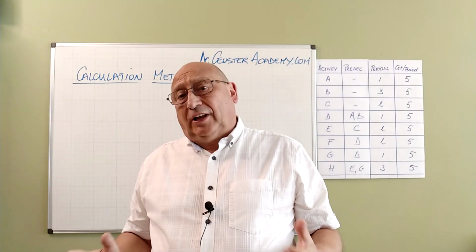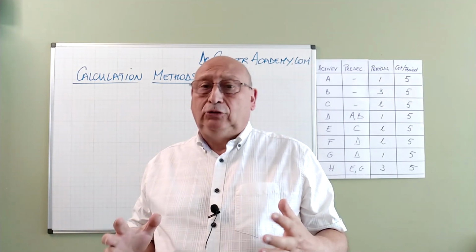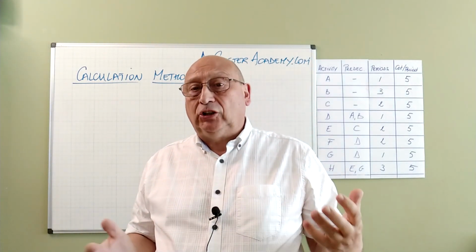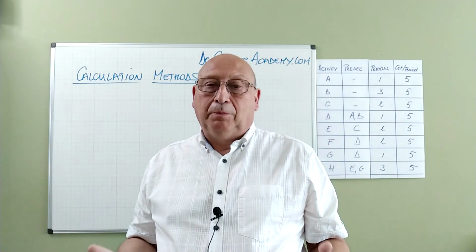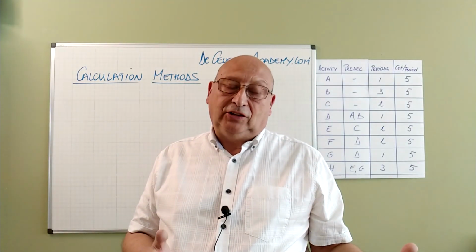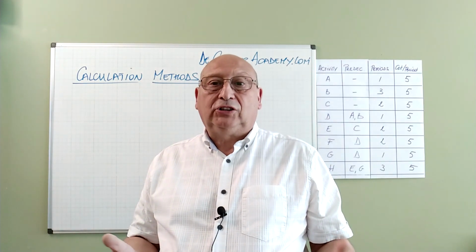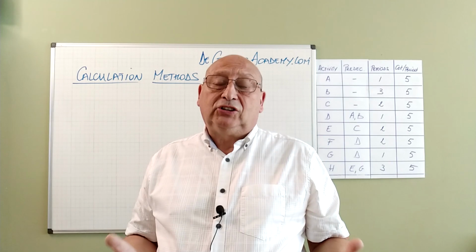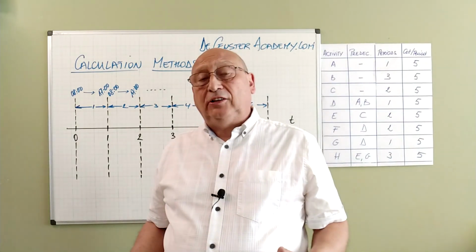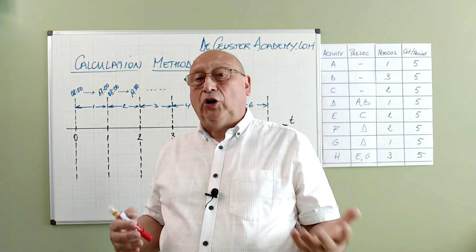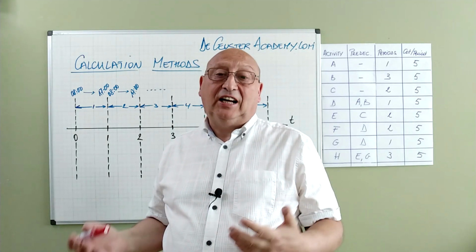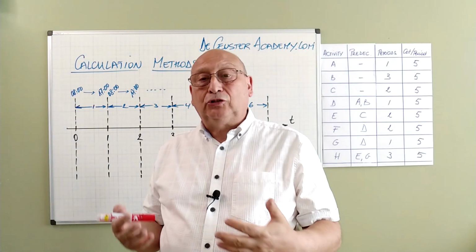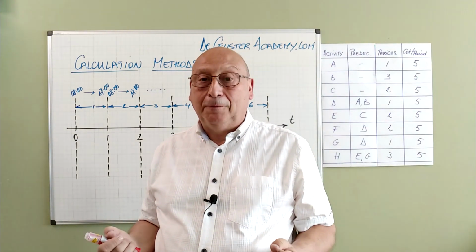Before we start calculating the precedence diagram, I want to show you that there are different ways to look at the calculation methods. Some people will prefer the method starting from 0 or the method starting from 1. Typically in the PMI they use the method starting from 1. Before starting with the actual calculations of the early start, early finish, late start and late finish, both are basically equivalent. There is just a small difference in interpretation.